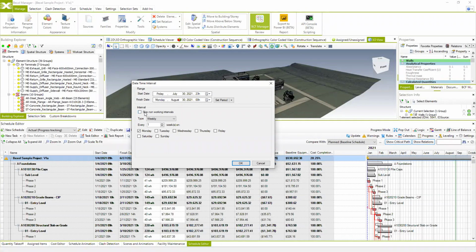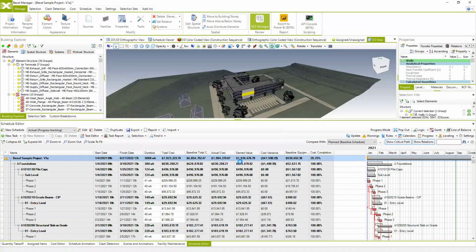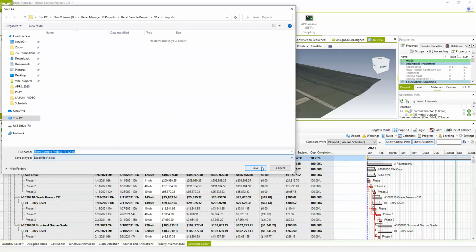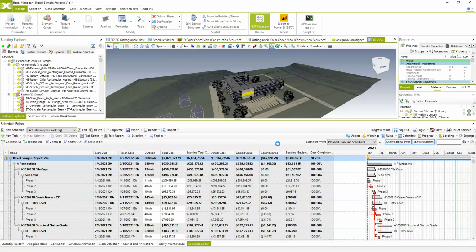And of course, you can specify how detailed the information will be, so it can be included on a daily basis, on a weekly basis, on a monthly basis, or so on. The best results are received if you use the daily option, but we can use any other for generating the report. So in this case, I'm going to use daily, hit OK, and the system will create a monthly certificate for me. I'm going to show you how this monthly certificate looks like.